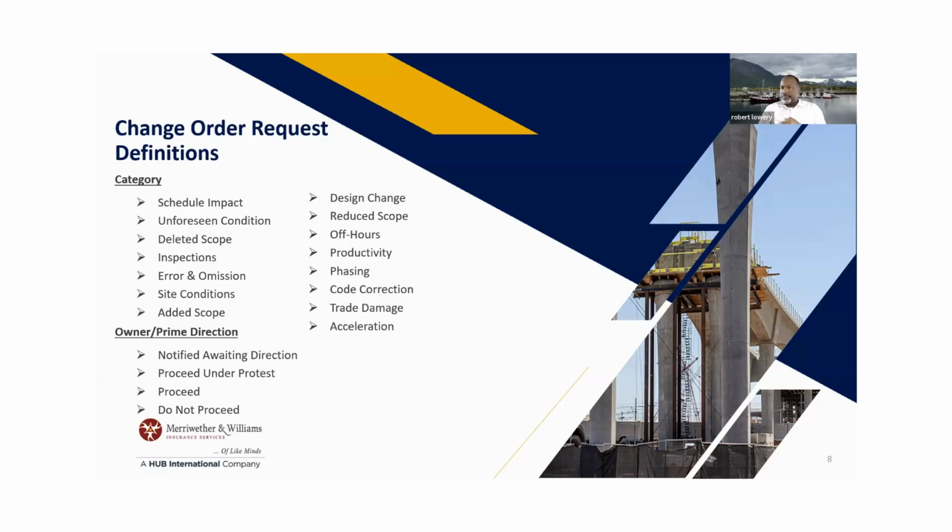Mr. Lowry, thank you. Yeah, I'd like to say something about that. Some contracts are written so that if there is an extension in the contract and/or a change order, the subcontractor must be available. You've seen those contracts. So you've got to read your contract thoroughly, because they will demand it. If you aren't available within the timeline that the GC or owner says you're supposed to be, they can give it to someone else and charge you back for that. You're right. Thank you for bringing that up.